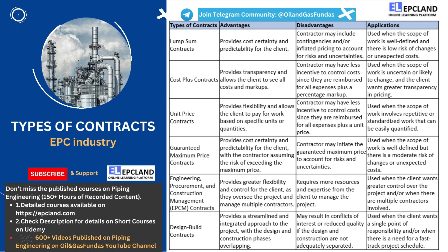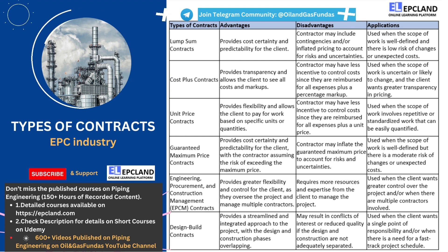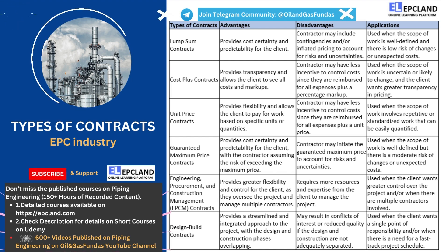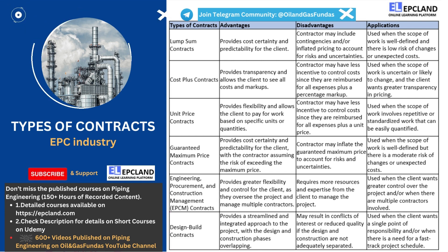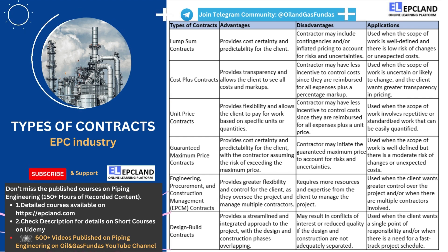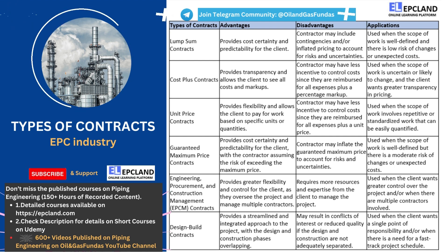The following contract on the list is the third one, which is unit price contracts. Unit price contracts are another type of contract commonly used in the engineering, procurement, and construction industry. They are typically used when the scope of work involves repetitive or standardized work that can be easily quantified. One of the main advantages of a unit price contract is that it provides flexibility and allows the client to pay for work based on specific units or quantities. With a unit price contract, the client pays the contractor a predetermined unit price for each unit of work completed. This can be particularly useful for projects with a large number of similar tasks, as it allows the client to easily adjust the scope of work as needed.